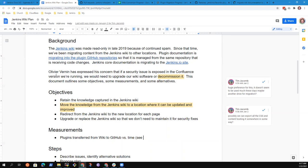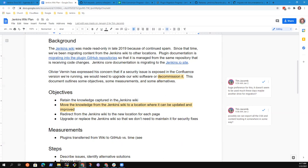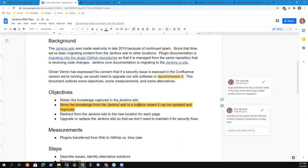Now, the motivation for this possible transition is that if there's a security issue in the Confluence version we're running, we need to upgrade it or decommission it. And we don't want to lose the knowledge we've captured there.